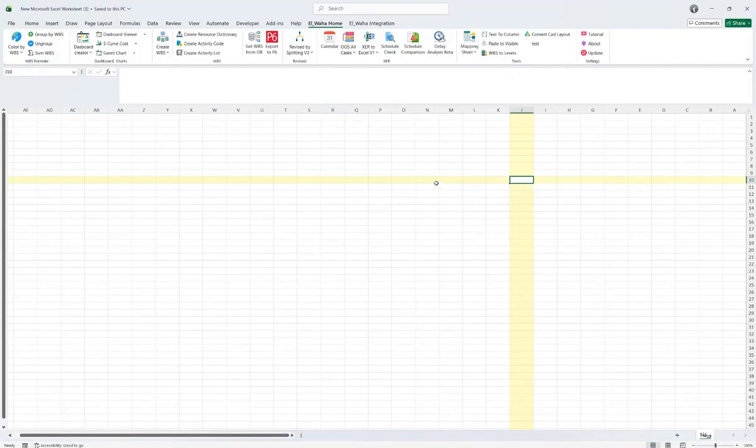God willing, in this video, we will talk about the delay analyzer. The goal of this tool is to perform a delay analysis for you and specifically tell you which activities caused the project delay. So for example, you have last week's update and this week's update, and it performs a comparison between the two updates. And it tells you exactly which activities caused the slip in your project.